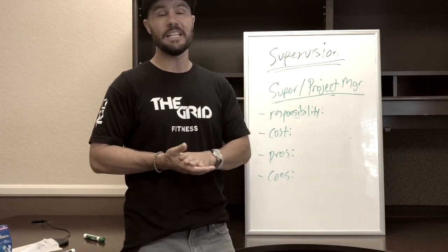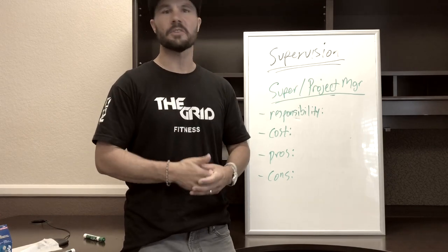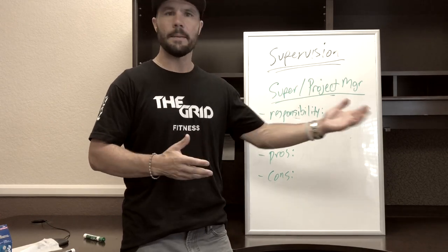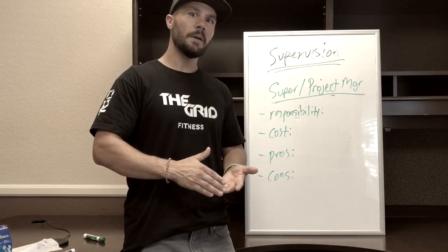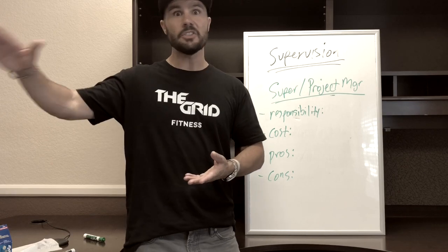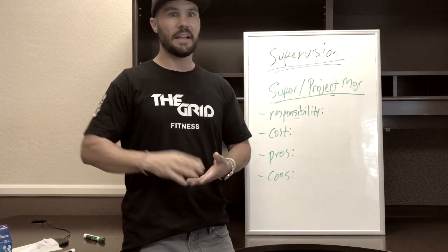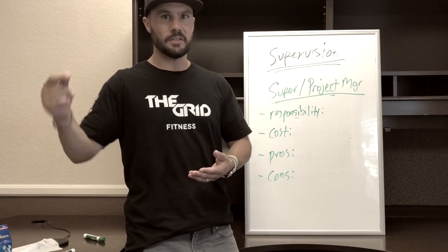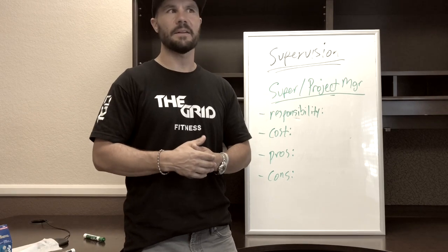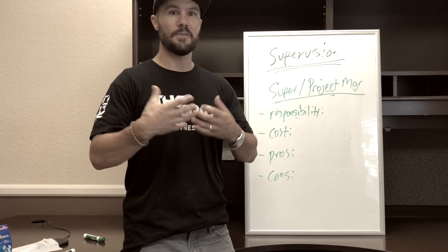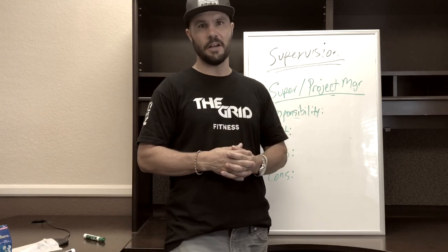My goal is to be 3 deep on every contractor. I want to have 3 HVAC contractors, 3 plumbers, 3 electricians, 3 different demo guys, 3 different drywall guys, 3 different painters, 3 deep. That way, if I'm having an issue with one of my subs or they can't show up when I need them to, I've got another one to call. And they're competent, they're good, they're priced right. I'm not 3 deep all the time in every area, but I usually find myself in trouble when I'm not 2 to 3 deep with every sub.